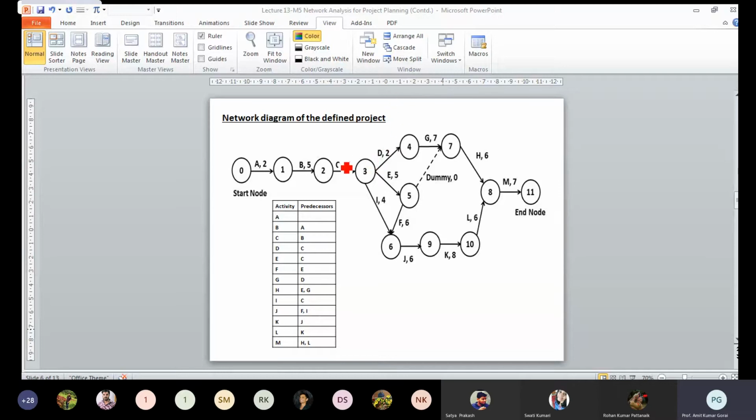So you can start all three jobs, but if you don't have sufficient resources and manpower to conduct all three jobs, you have to first give importance, as I already mentioned, to the critical tasks. Which are the critical tasks? If you have additional manpower and resources, you can deploy them and work on the three activities concurrently. For a non-critical task, you have some flexibility, you can delay to some extent, and there is a limit to how much delay you can allow in a particular activity. You can analyze the start and end times accordingly for further analysis of this network.